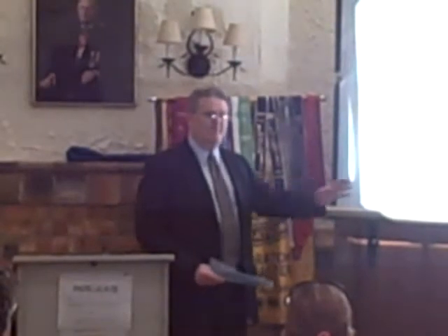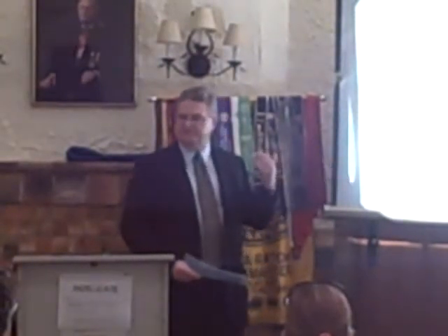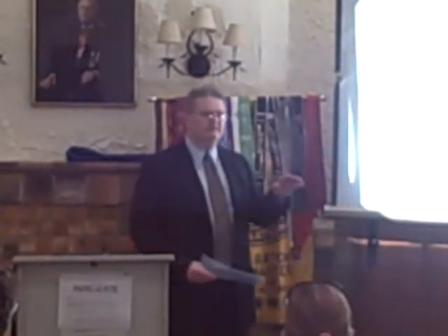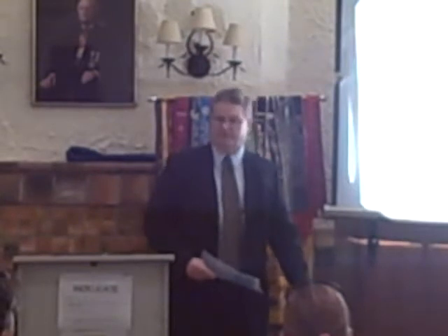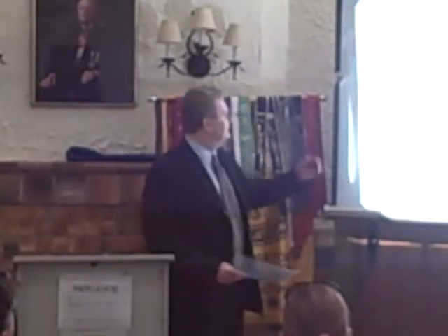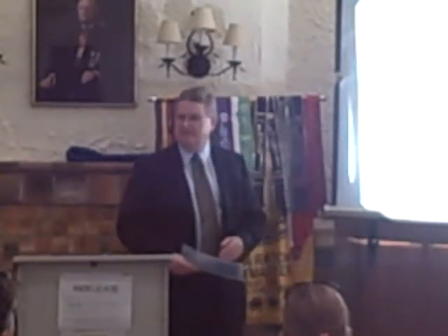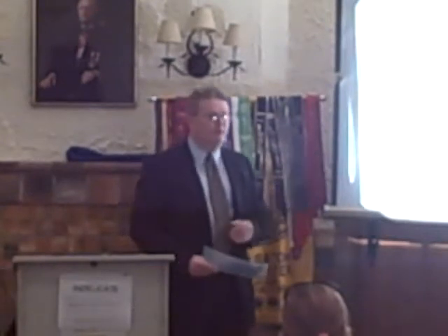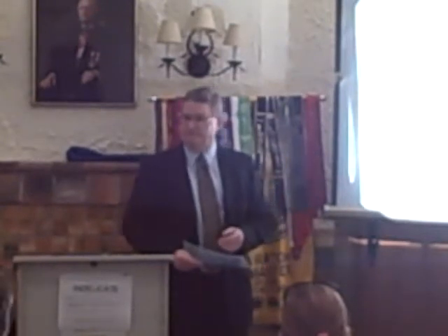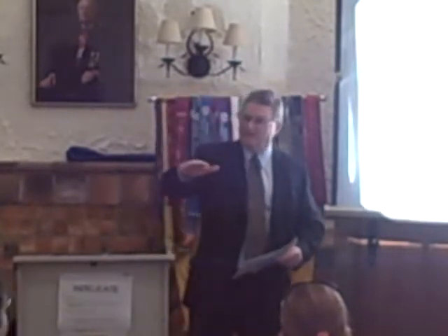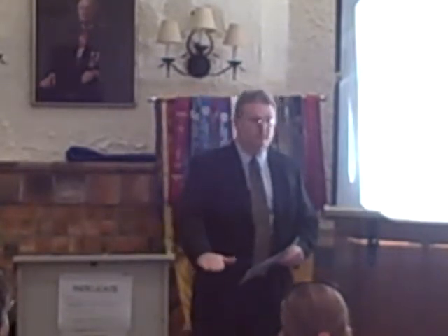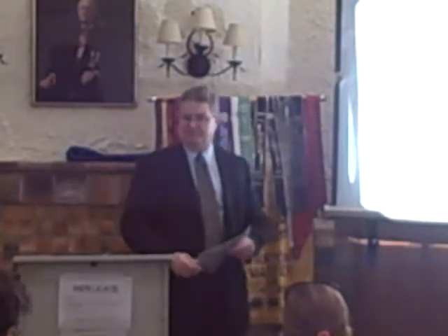Preventive actions happen before a problem occurs. They are intended to reduce the likelihood that the potential problem will occur. Contingent actions, on the other hand, kick in after the problem has occurred. Their intent is to lower the impact or the seriousness of the problem once it has occurred.